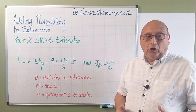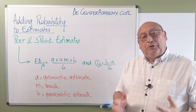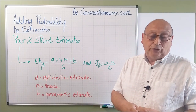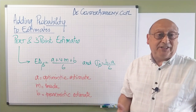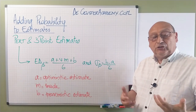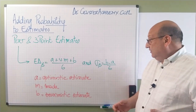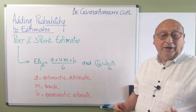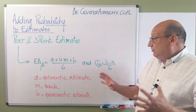When we have this value, we know there is a 50% probability that the project will finish faster than this duration, but also a 50% probability that it will be more than this duration. When we have an average, we also want to know what is the standard deviation. The same principles have been used to determine the standard deviation for the beta distribution. The formula is sigma = (B − A) / 6, where B minus A is the range of the distribution.